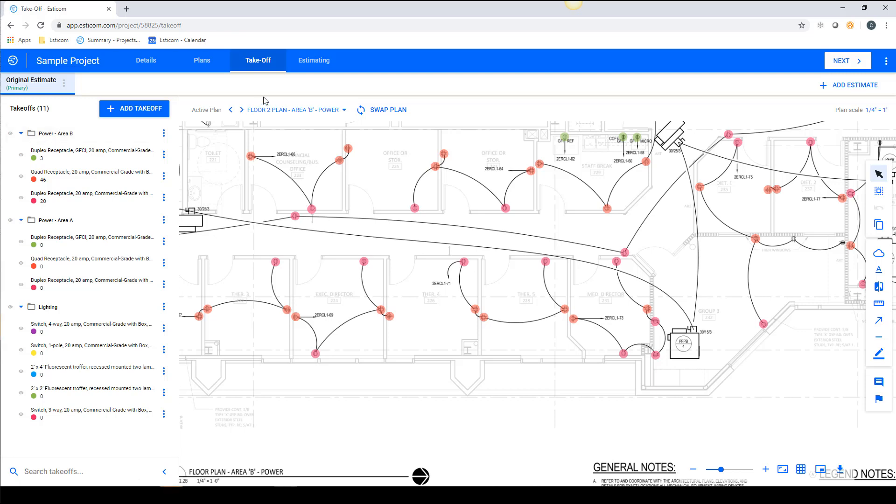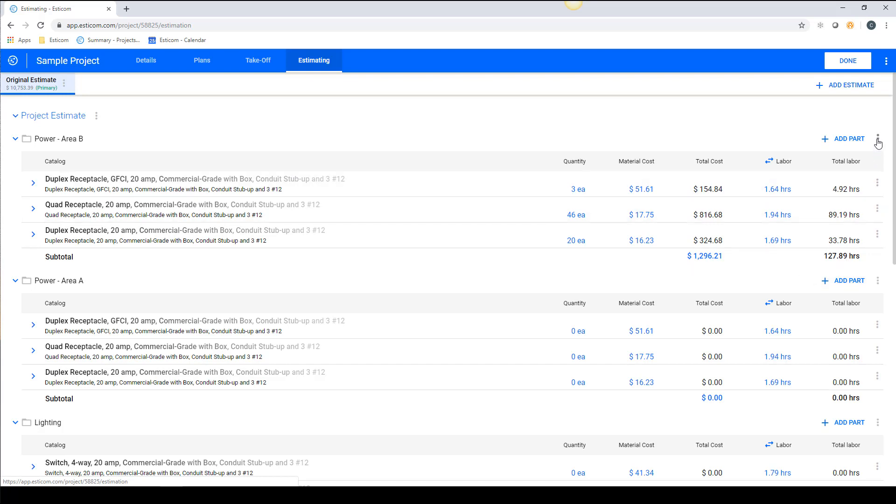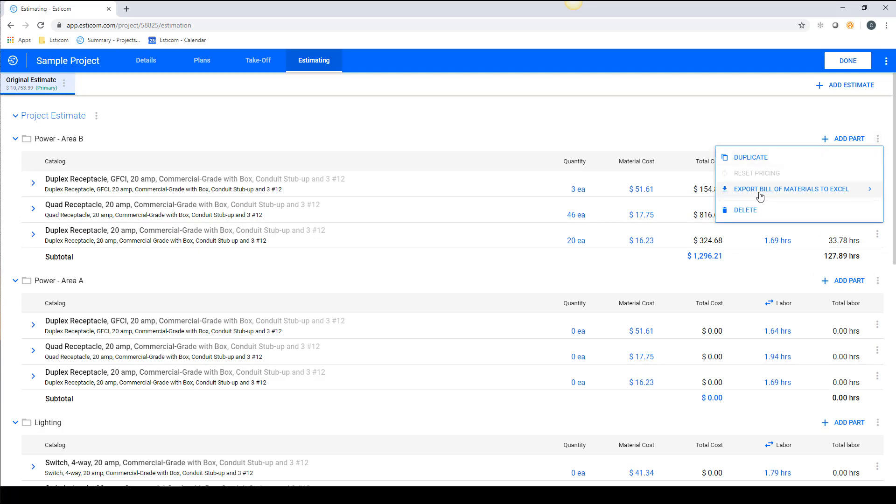When you browse to the Estimating tab, you'll notice the takeoff counts remain in their respective groups and display valuable information like the material and labor costs for the group. And you have the ability to export the Bill of Materials for quoting and material ordering purposes.